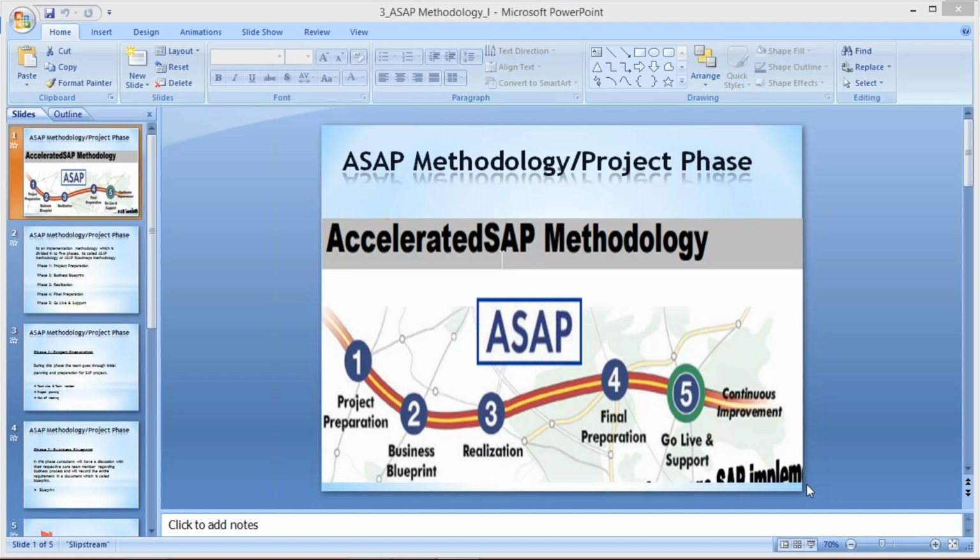So this is how: 2 months for foundations, 2 months for wall constructions and all, remaining 2 months for door and window installations, isn't it? Likewise, 6 months or 7 months. So likewise, they will assume a final duration: okay, in 1 year we are going to complete the entire construction work, and after 1 year we will hand over the ownership to the customer. Based on this plan they are going to promise the customers also: invest now and get the ownership of the flats after 1 year or 2 years, whatever the duration is.